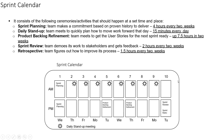Starting from day one to day ten — on day one we do sprint planning, where the team makes a commitment based on what they can deliver. The product backlog items or the list of stories the team will choose and agree to complete by end of the sprint. Standard guidelines per scrum is that we should not take more than four hours for a two-week sprint to complete the sprint planning activity — that is the activity that starts your sprint.